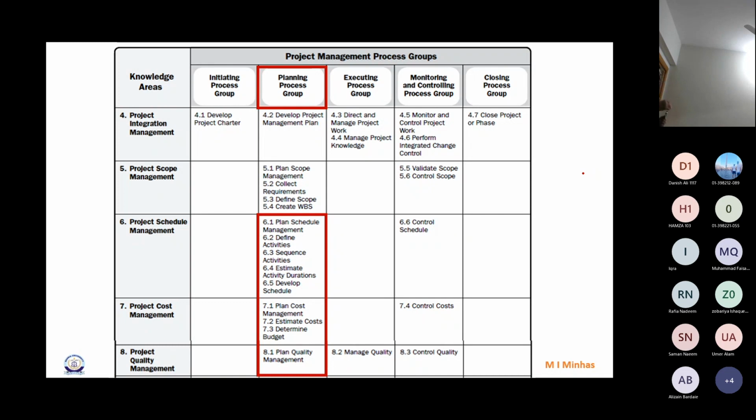Once work is being done on the project, there will be some quality people who have all the instructions with them, which would have been prepared before that in the quality management plan. They will have those instructions in the guide, and they will see, okay, now the truck has arrived, this is passed, cement tested, passed, sand tested, passed, okay, everything passed. Now the next thing is to mix them. How many bags of cement with how many bags of what would be the ratio? There would be an inspector, quality assurance staff, standing there, saying okay, mix this, okay, fine, mixed.